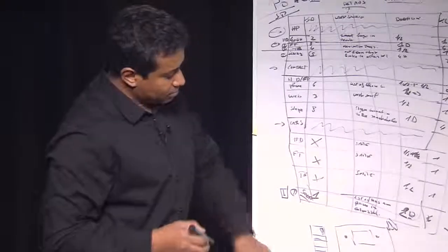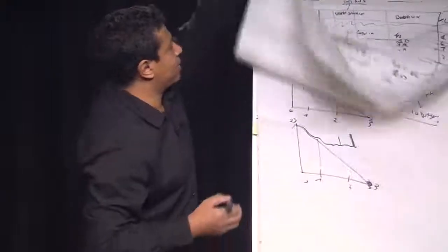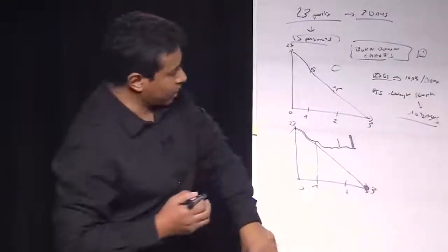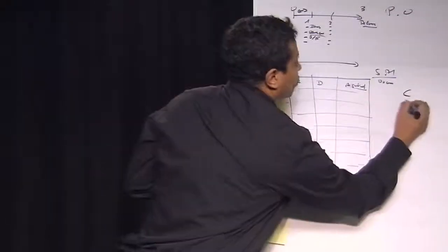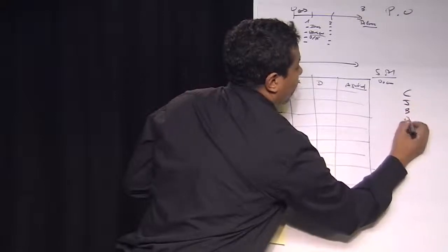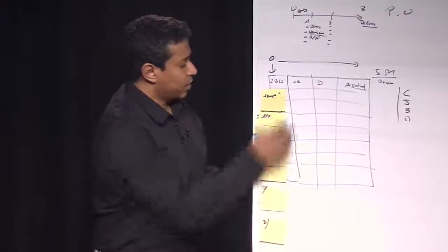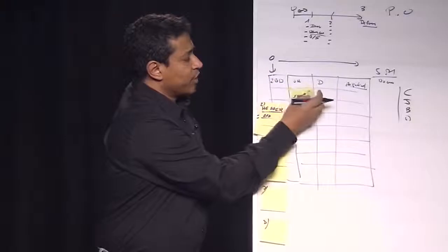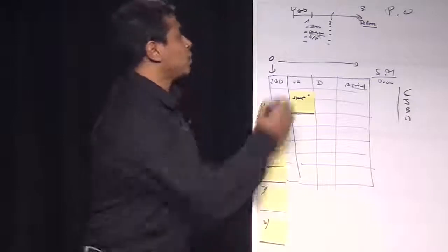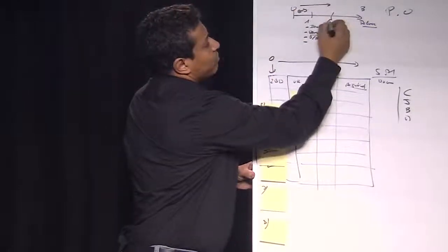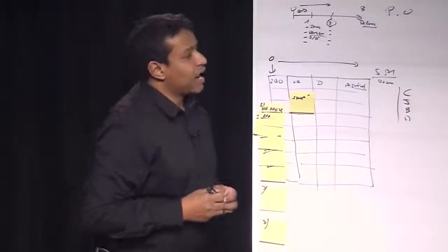I said, let's do shop 2 days, which makes 24. The shop's 2 days, meaning that if my friend Charles, because I've got my crew there, Charles, Joe, Ben, Mark, if my friend Charles just takes this, he's going to put it on running, but it's going to last 2 days, which means that the shop can be ready before day 2. So what are the items I have to put on day 1?